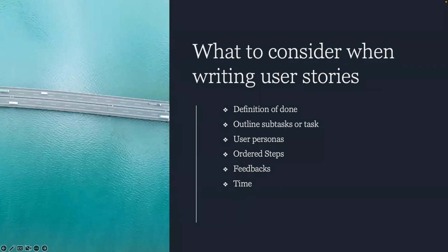So you also want to think about the time. Depending on the sprint you work with, if it's a 1 week sprint, I know people work with 1 week. If it's a 2 week sprint, which is a very common one, 3 weeks, 4 weeks, it can be between a week to 4 weeks. You want to ensure that what you're writing and the number of user stories you're putting in is going to be done at the end of that sprint, so that you don't have it sent back. But we're going to get into that as we move on.